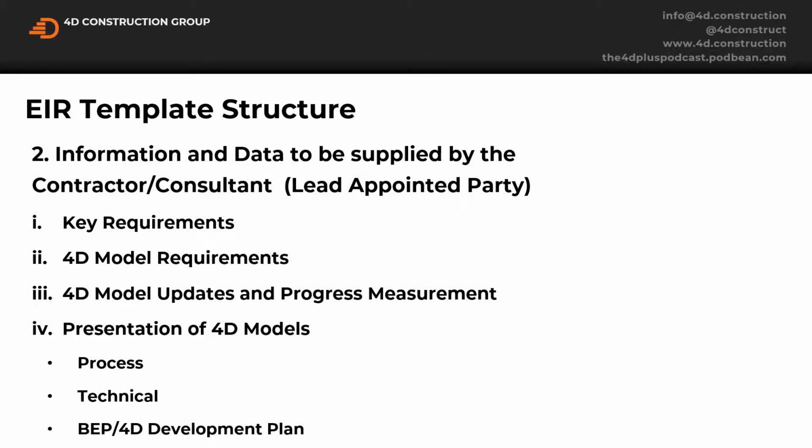It's okay in your own environment when you are a contractor delivering just your package. But like I've said, if you're on a mega project and you ask for 4D and you're not clear with your requirements, the same as BIM, you will get lots of different responses. I've seen mega projects with multiple different suppliers that have used completely different software that cannot be stitched together.